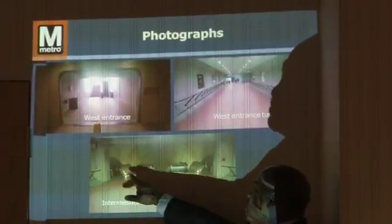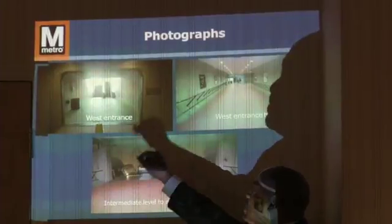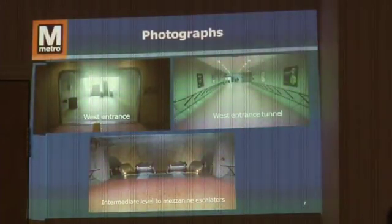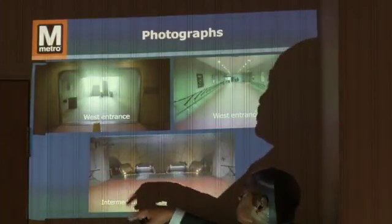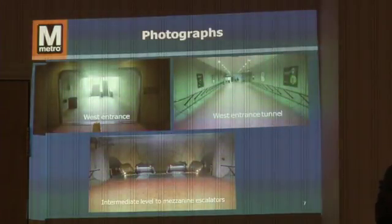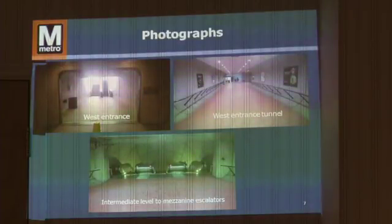This is the escalator that we'll be removing first, and then we'll also be removing the west entrance street escalator as well. This escalator will allow us to remove the truss sections out of the station easily. So therein lies the safety and the concern that we have with maintaining those stairs open while we do that.